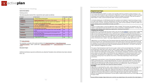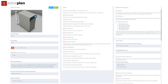The designer or contractor responsible for the heating system gets a specific set of requirements they need to provide. The asset team can drill into each individual asset type and switch off the data they don't need — such as colour or finish for a boiler — but ensure they get the information they do need, such as expected life.